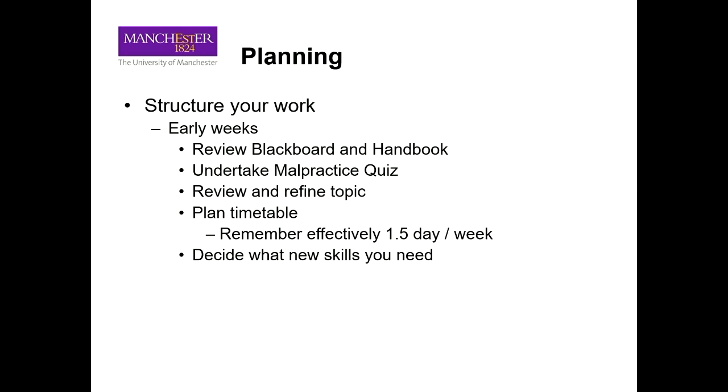Make sure you can access the resources in a cluster or on your computer. If you need to use labs, okay? Labs are difficult to access, okay? We try to make labs accessible as much as possible to students, but there's some heavy bureaucratic, unfortunately, process to go through. You need to write a risk assessment. Your supervisor will need to make the case and arrange for you to access the lab.